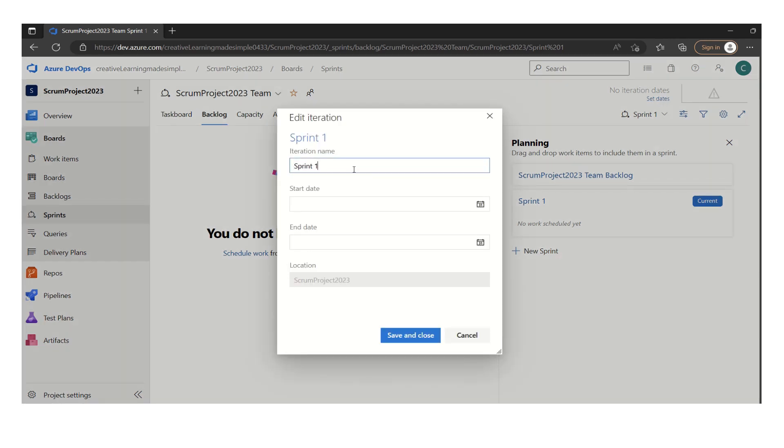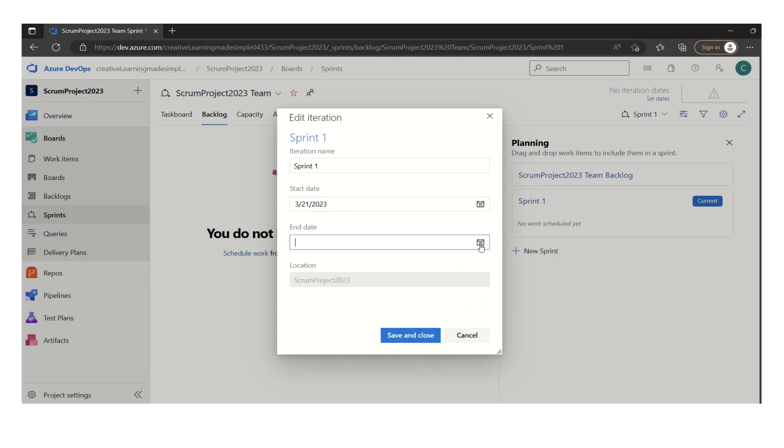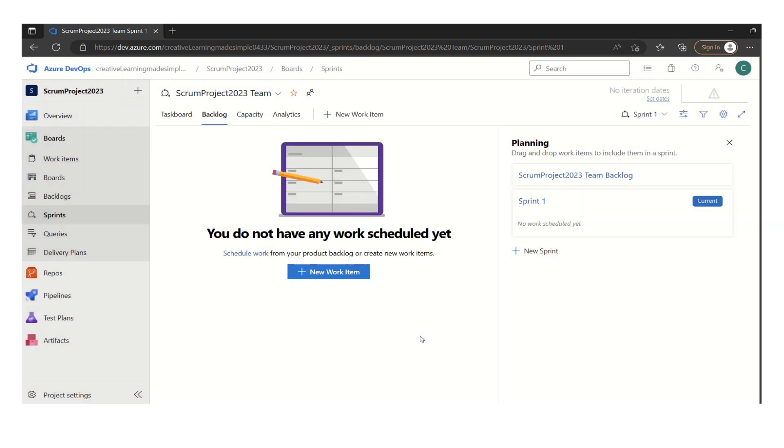So this is the sprint one. In case someone wants to change sprint one to iteration one, we can change the name here. Now the start date is going to be, we want to start from 21st and it is going to be two weeks. That means it will end on third of April. So if I simply click on save and close,